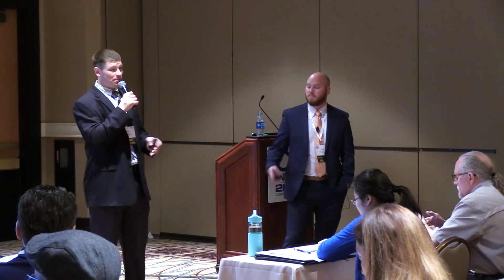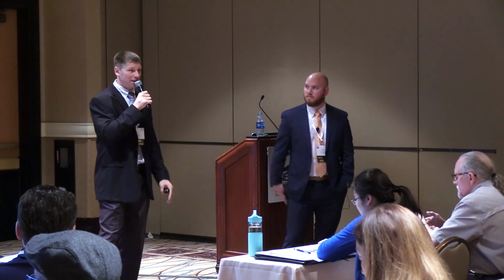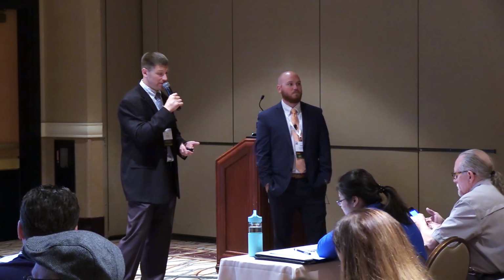No matter what that is, we're going to go through, identify that, and then we're going to try to put a cost to it. And that's probably the most difficult part, especially today. Construction costs have just gotten really, really volatile. So you got to be careful here where you're trying to put a cost to these corrective actions. And a lot of times you want to have a certified cost estimator do this, or a lot of times we'll try to get a contractor. If the owner has a contractor they like to use, we'll try to get them to give us an estimate or something so that we're going in with some realistic costs.